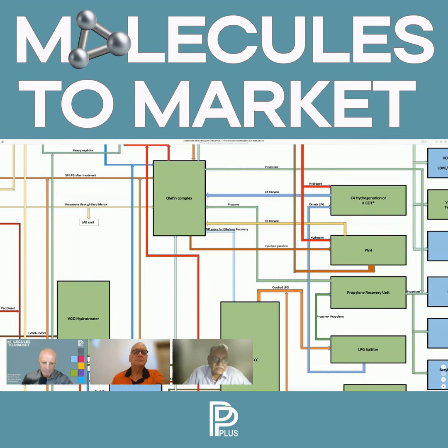So for the overall investment, it is necessary to inform the board as to what is the mode of implementation that one is considering, whether it is wholly EPCM, wholly EPC, or a combination of the two, or part EPCM, part EPC, part OBE, or part BOO, or a combination.